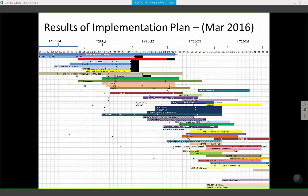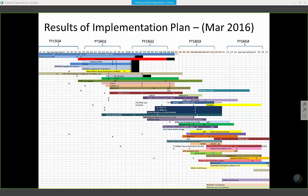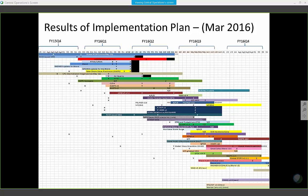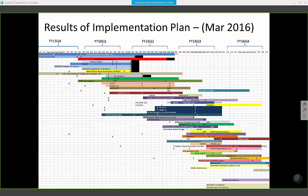Okay. And we're going to zoom in by quarter. Go back. Forward. Those projected end dates from last time are represented in the new plan with a letter, right? Correct. This end date on the December slide got a Z in the last colored box on this slide. So look at the blue in the middle. That's the wrap and the her. The plan in December was that they would go in the middle of May, Q3, early May. And now it has slipped a month or so, right?